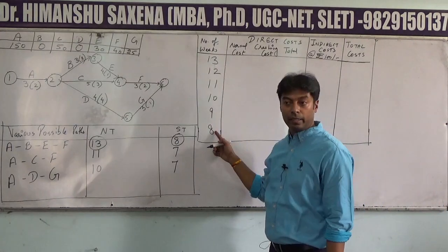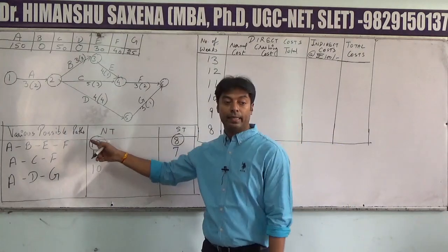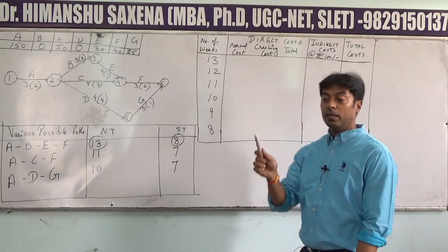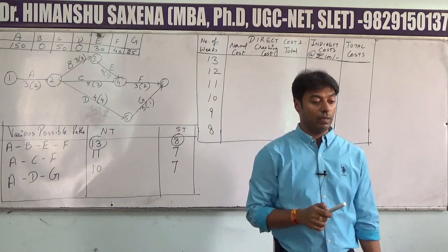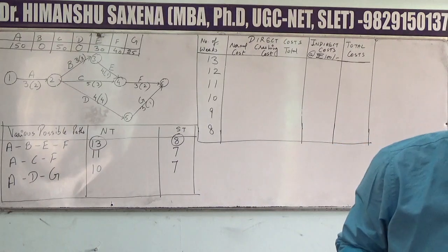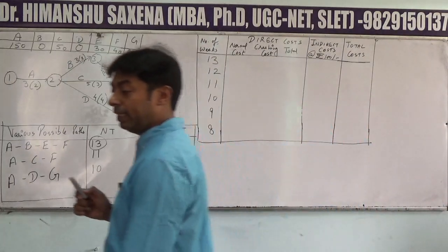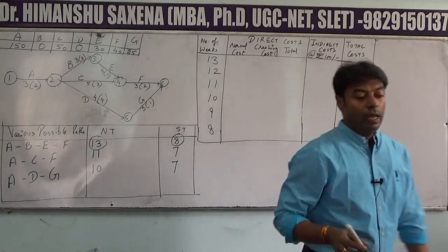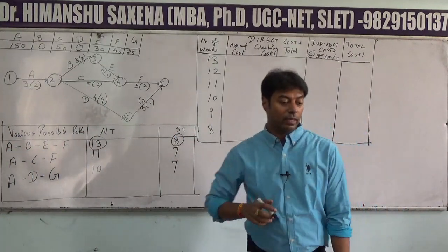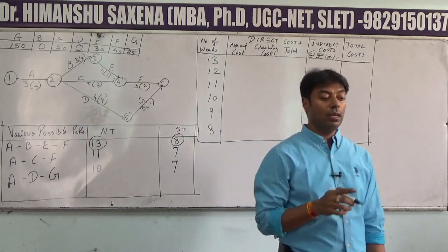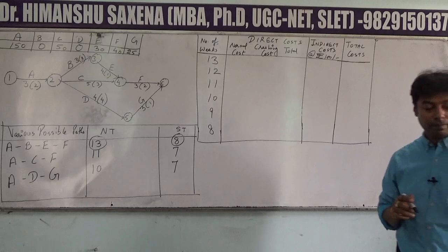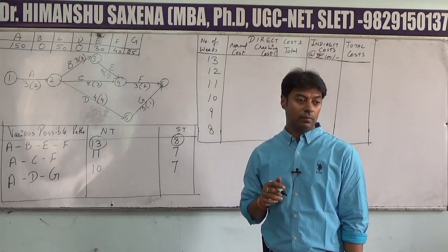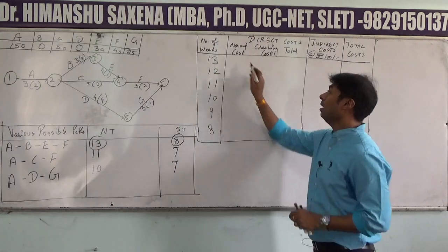First of all, is this duration clear? This was achieved by taking the highest values from both these columns, right? Now just tell me, what is the total of the column which is giving us normal cost? To achieve the total normal cost, you have to total all the values in this normal cost column. So please add up all the values and tell me the final answer. What is the value of the total normal cost? 945. Now remember,